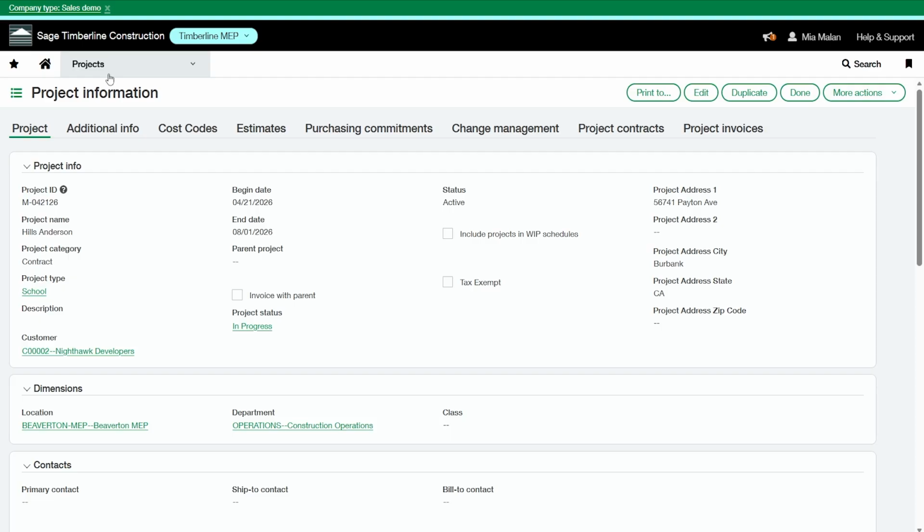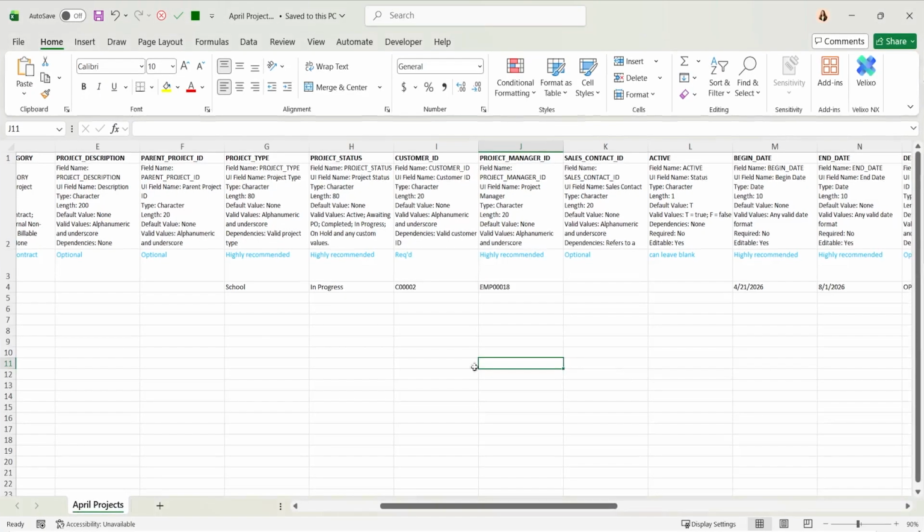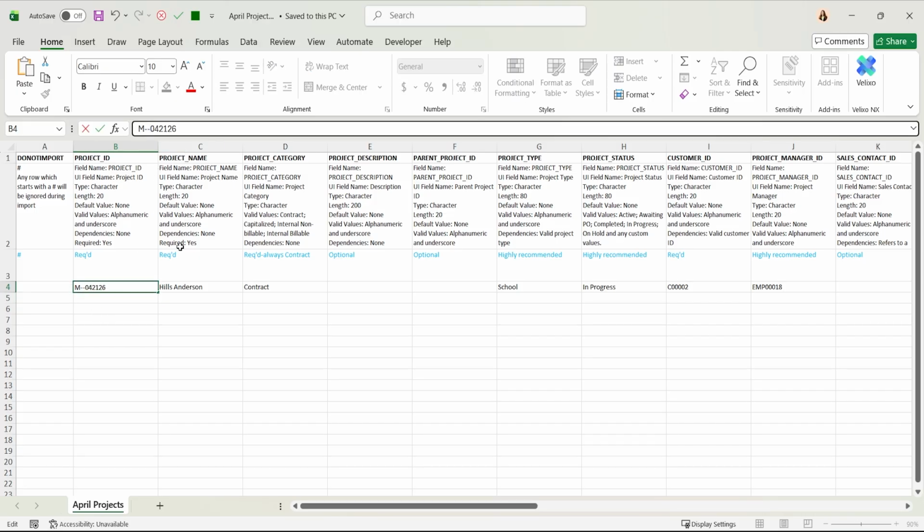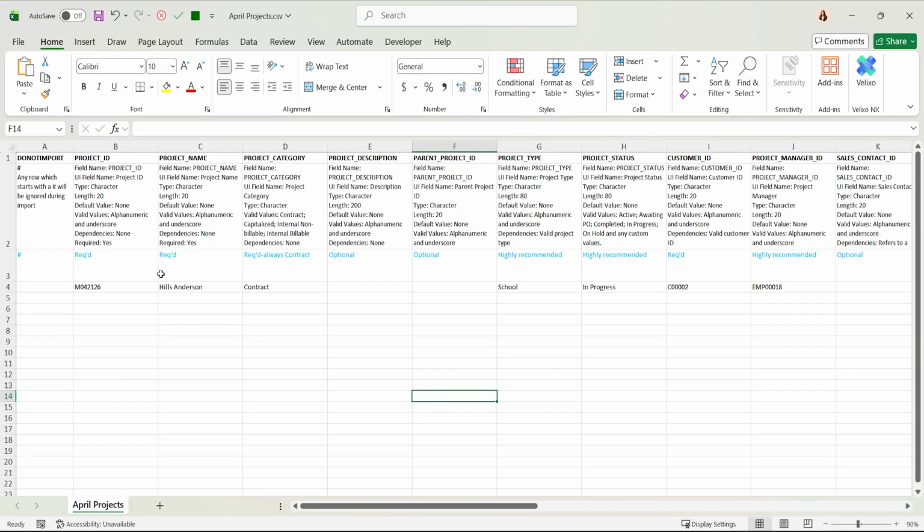That's pretty much it. Try to stay away from special characters in your project IDs and names. You will receive errors down the road, so don't use pound signs, asterisks. Stick to letters and numbers here. You also can't use double dashes or double spaces. Underscores are fine. And keep that logic in the project name too.